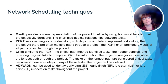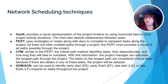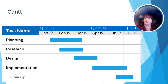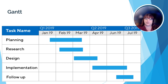There are a number of scheduling techniques that a project manager can use to help them visualize how the project is going. Often, project managers will use one of these techniques as they begin to build the project schedule. The Gantt Chart was named after its creator, Henry Gantt. It's probably the simplest tool as it shows the project tasks and the time it will take to complete each task. The project manager can see at a glance where there is overlap on the project tasks.